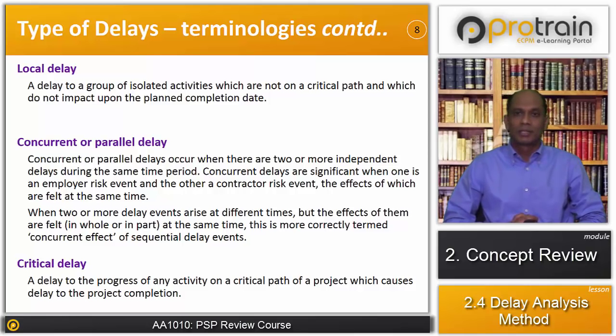During the course of the project, there is a 1 month delay in the arrival of the transformer at the project site because of transportation issues. Both the delays are affecting the installation of the transformer, testing and commissioning of the transformer, and eventually the completion of the project. However, both the delays are not occurring at the same point of time. So they would not be concurrent delays. However, there will be delays having concurrent effect.